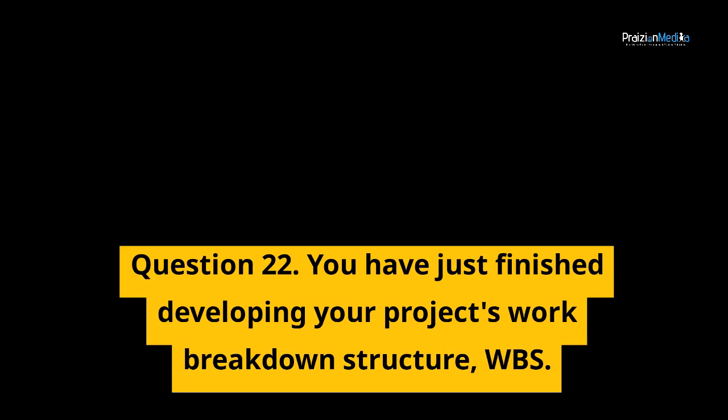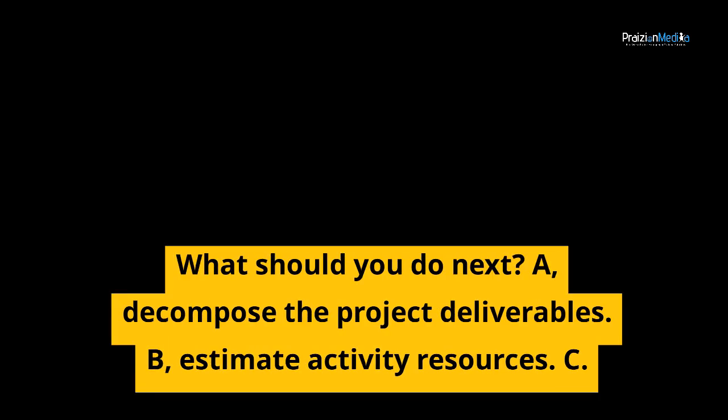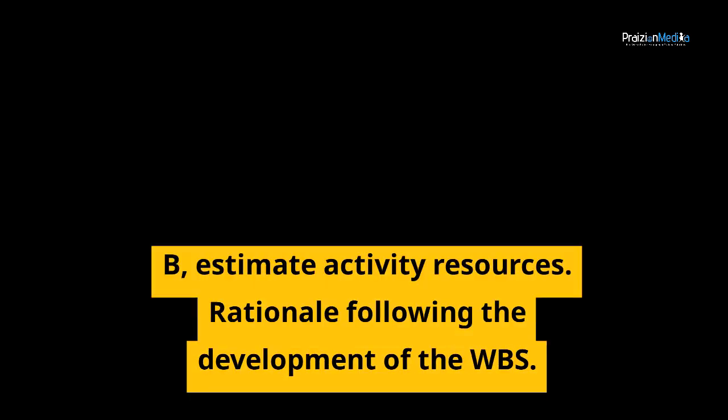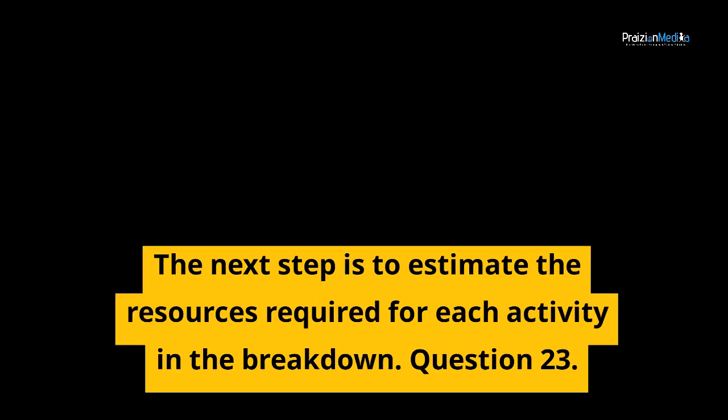Question 22. You have just finished developing your project's work breakdown structure, WBS. What should you do next? A. Decompose the project deliverables. B. Estimate activity resources. C. Define the scope of the project. Correct answer B. Estimate activity resources. Rationale. Following the development of the WBS, the next step is to estimate the resources required for each activity in the breakdown.